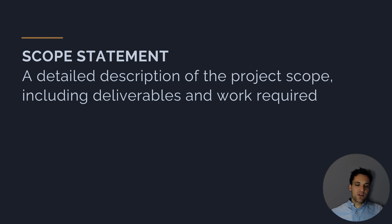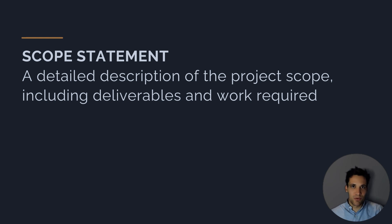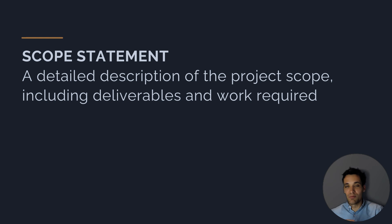Once we've collected all our requirements, we put them together in the project scope statement — a detailed description of the project scope including the deliverables and the work required. The project scope statement will feature the product scope, the deliverables, and also the entire project scope, defining the work we need to do to complete those deliverables. The scope statement is one of the most important project documents — it will prevent scope creep, budget blowouts, and schedule delays, because we clearly know and can articulate the work we're going to be doing.